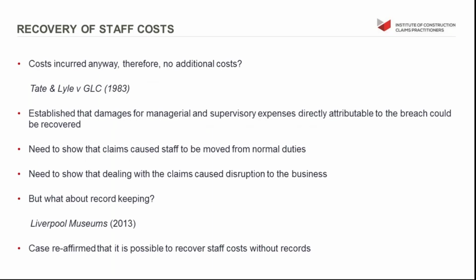Okay, the case that's most useful in this one is Tate Lyle versus the GLC in 83. And what this one did was it established that where there was some sort of default on the other party, it's possible to claim and recover your damages for your expenses directly attributable to that breach.